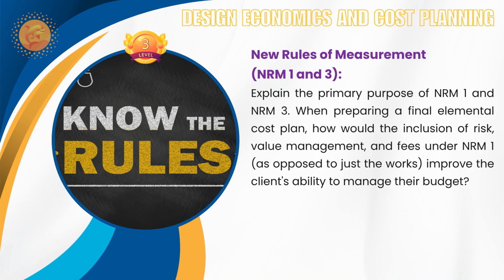So this will give you benefit from NRM 1 cost element group, like you can say the project design team fees and again other development cost. This ensures the total development cost is captured and benchmarked.